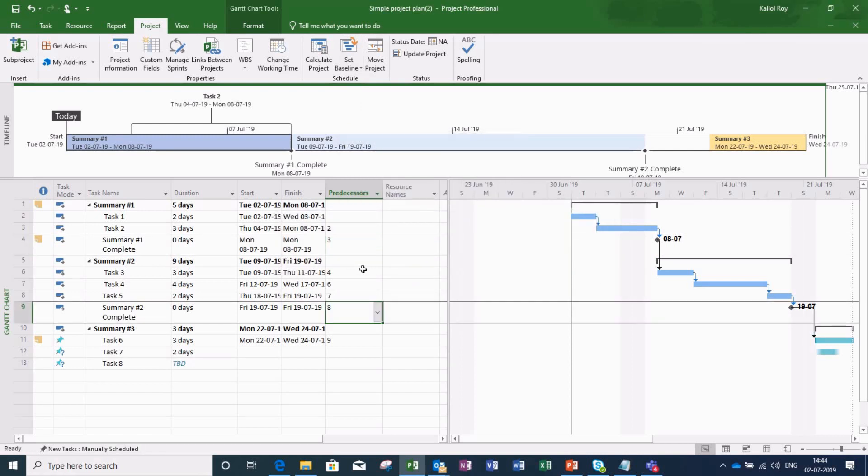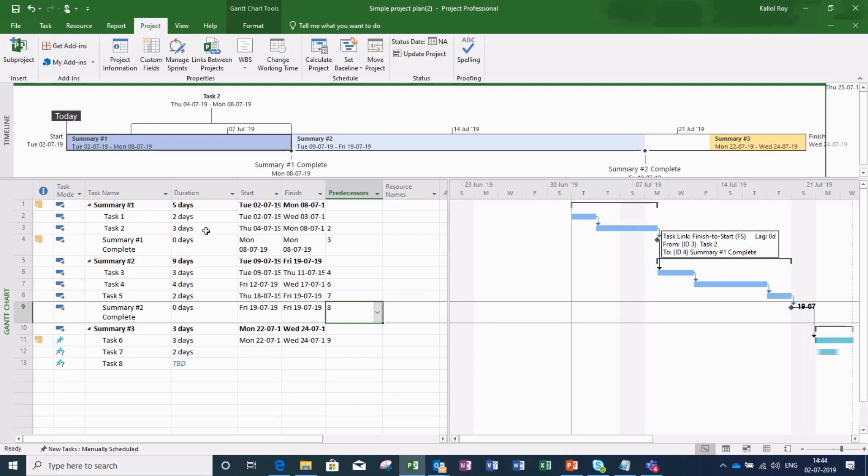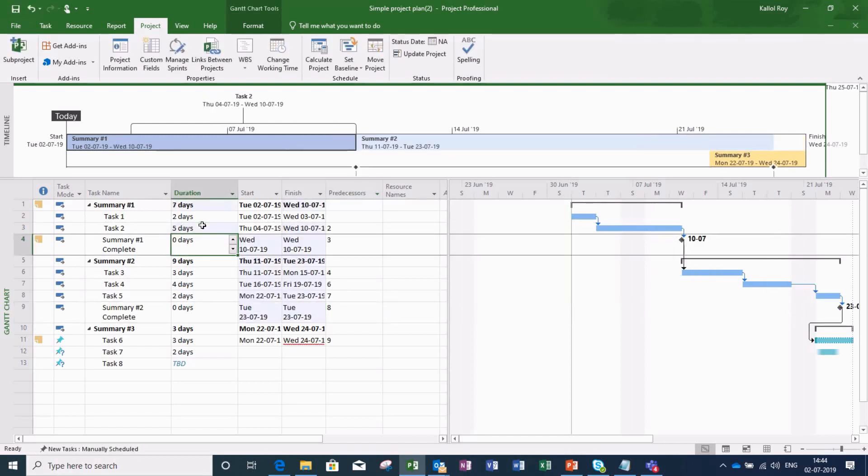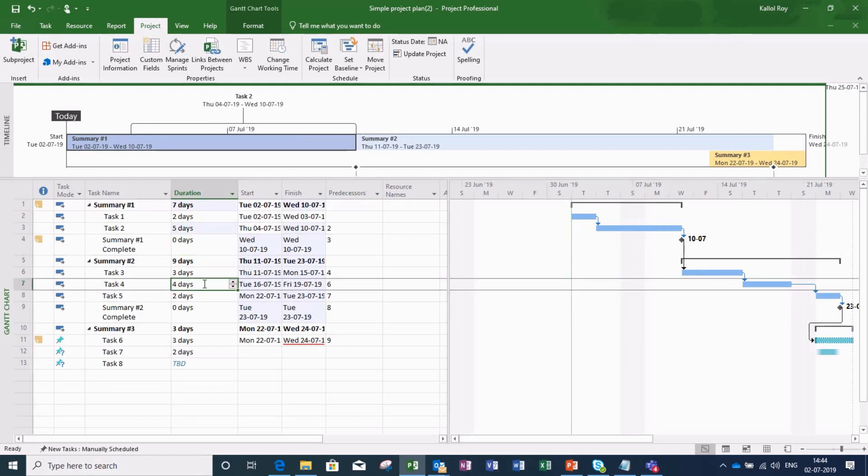Now let me do some changes in my plan and check it. I am extending the duration of this task by 5 days and contracting the duration of this task by 2 days.